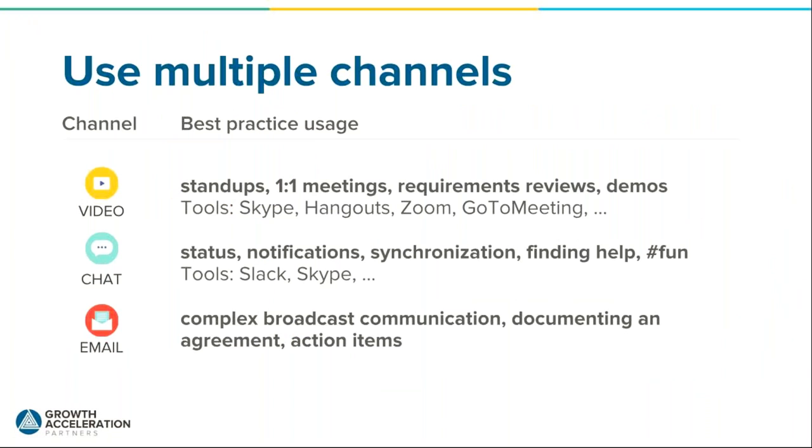Also, use multiple channels. We talked earlier about there's different effectiveness. This is kind of the best practice that we've developed for which channel is right for which environment. We use video very heavily for stand-ups, for one-on-one meetings, requirement reviews, demos. We encourage everyone to have video on as often as possible to be able to have that deeper connection. For status information, notifications, finding help to questions, chat is a great technique. You can broadcast a question and anyone from the team can see it and go, okay, I can answer that one. So it's a great medium for that.